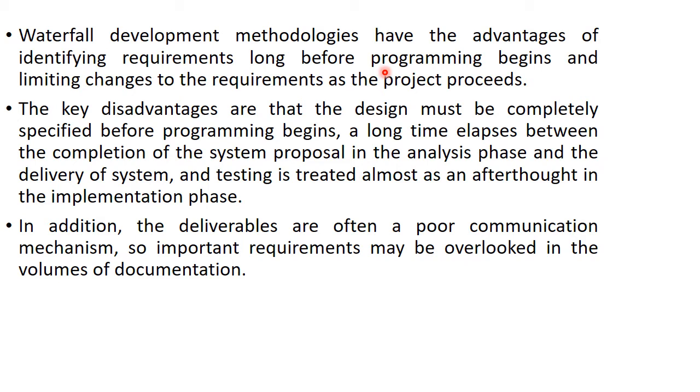The disadvantage of waterfall development methodology is that the design of the project must be completely specified before the starting of the programming. A long time elapses between the completion of the system proposal in the analysis phase and the delivery of the system, and then testing is treated as an afterthought in the implementation phase.